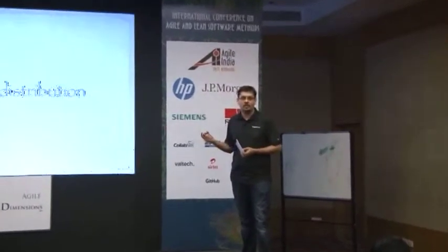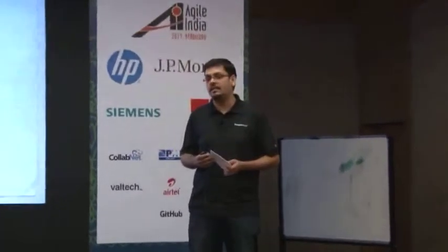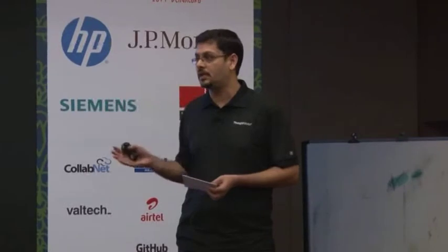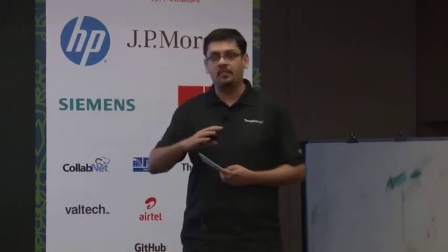This one may seem obvious. We talked about it in the inception team, but the clear lesson for us here is that every location that is involved in the development needs to have a cross-functional team. We've seen it at many client organizations where they try to do distributed with the QA team, a test team sitting in one location, some developer sitting somewhere else, an architect sitting somewhere else, and a project manager at the customer location, and that's a big dysfunction for us.